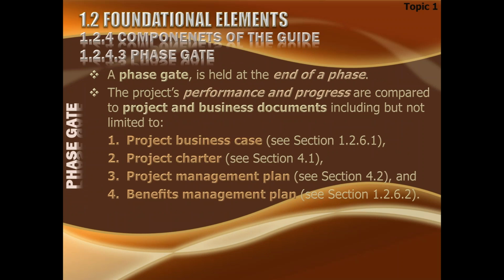So phase review, where it is done, this is the phase gate where we conduct the phase review. Phase gate is held at the end of the phase, and that is the milestone. The project performance and progress are compared to the project and business documents, like the project business case, project charter, project management plan, benefits management plan. These things you have not studied, but I will be talking about them.